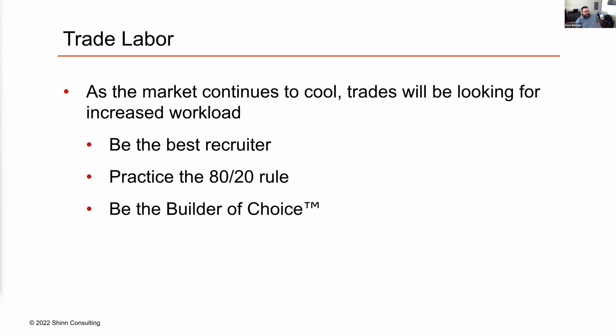I'm going to give them that database for their parts. And all I need them to do is tell me what they're going to charge me per part. So instead of asking them to do days' worth of estimating, I'm asking them to do 15 to 30 minutes' worth of filling out my spreadsheet, so that I can quickly apply them across the plans and know if they work or don't work.